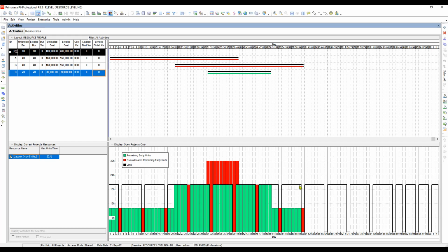But Primavera is following the condition that is specified for it to follow. The allocation here is already enough for one activity, so Primavera cannot add this one in here anymore because it is only good for one activity, and adding the resources in here is illogical.